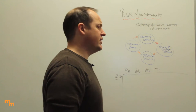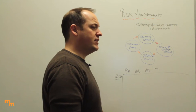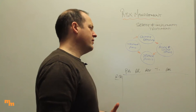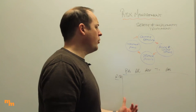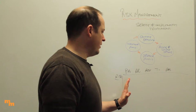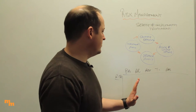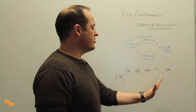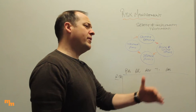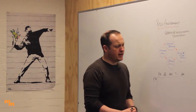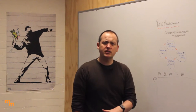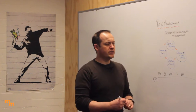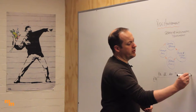When do I need to review this, who needs to know what by when? I need to think about my performance measures — how am I going to know whether my treatment is being effective? What should I see as a result? Once I've thought about my proposed action and started implementing it, with resource requirements assigned and responsibilities known, how and when am I going to check if it's working? Is it a reduction in severity, in likelihood, in consequences?